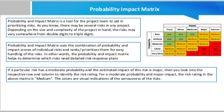The Probability and Impact Matrix uses the combination of probability and impact scores of individual risks and ranks and prioritizes them for easy handling. In other words, it helps to determine which risks need a detailed risk response plan. It is vital to understand the priority for each risk, as it allows the project team to appreciate the relative importance of each risk. For example, a risk with a high probability of occurring and a high impact on project objectives will likely need a response plan.